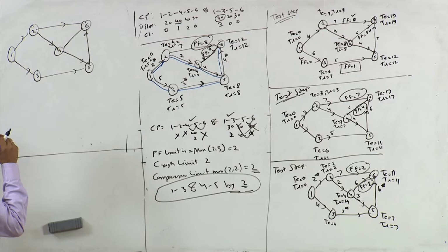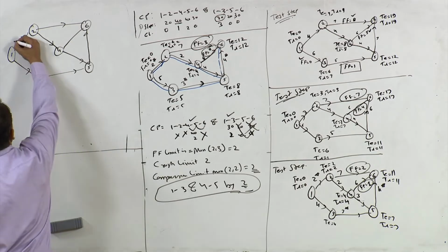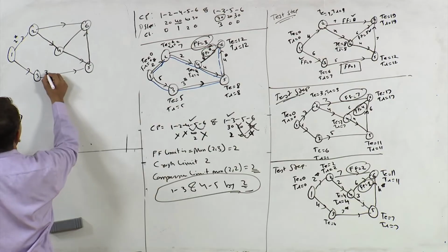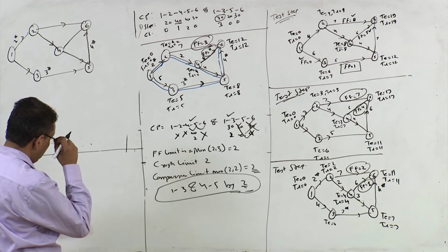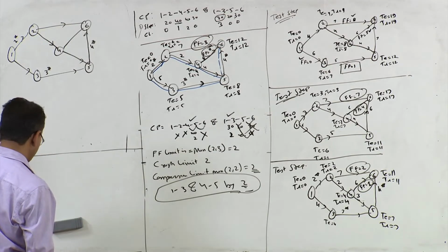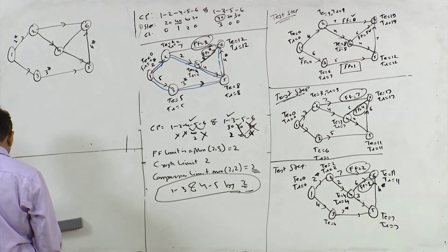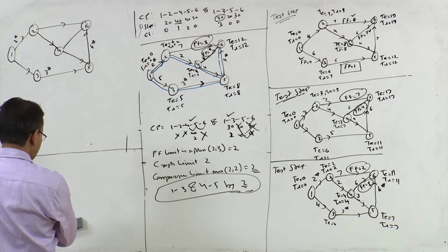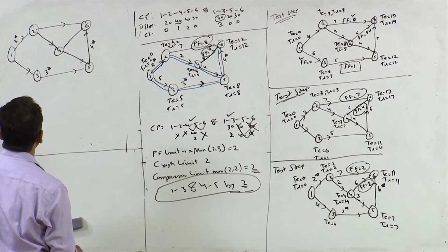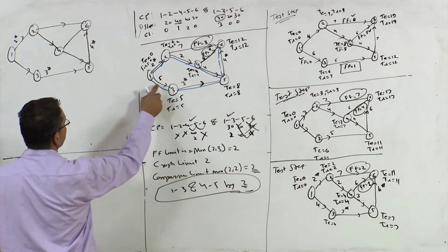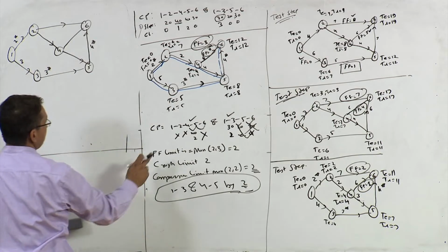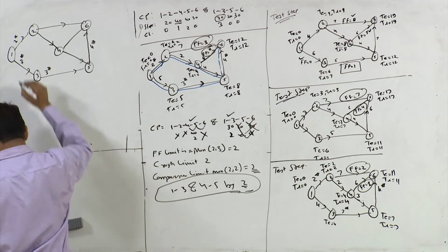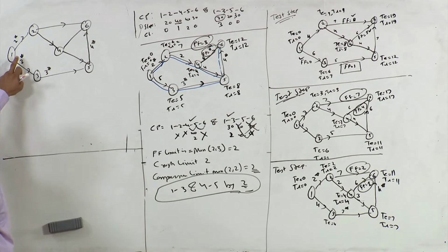And now we will write time durations for all these activities. So this 2 is fixed, 3 is fixed, 4 is fixed, right? And now since we are doing it for activity 1 3 and 4 5, 1 3, where is 1 3? 1 3 is this. We have to reduce it by 3 days. So this is now 2 days. We have to reduce this by 2 days. So this is now 3, which is also now fixed, right? You cannot reduce it further.